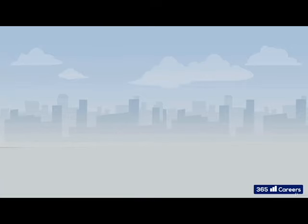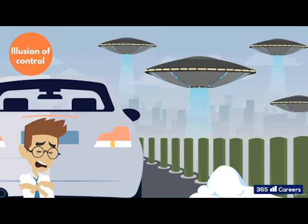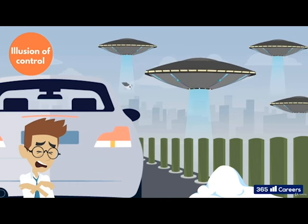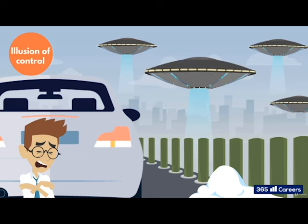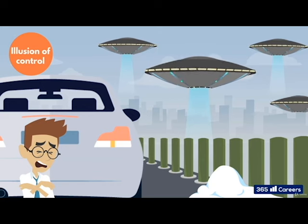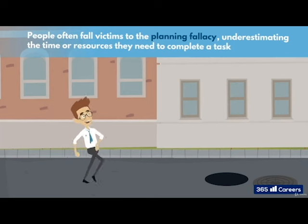Another factor impacting our ability to plan well is the illusion of control. This is just what it sounds like. In the broadest of terms, people often overestimate their ability to control events, focusing on the things they can control rather than the things they can't. Think of gambling behavior, for example. When people participate in dice games, they tend to throw the dice harder for high numbers and softer for low, as if that's going to make any difference. So what this journey into human cognition teaches us is this: People are generally bad at planning. And they often fall victims to the planning fallacy, underestimating the time or resources they need to complete a task.